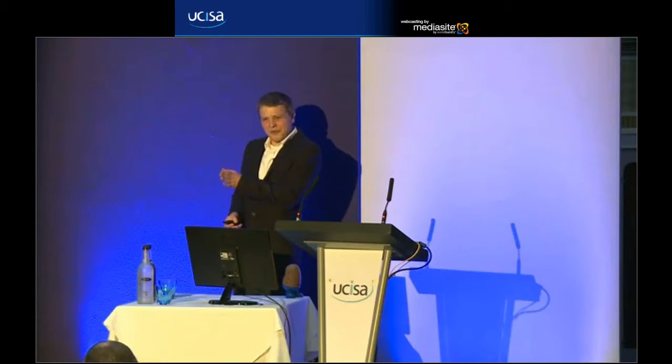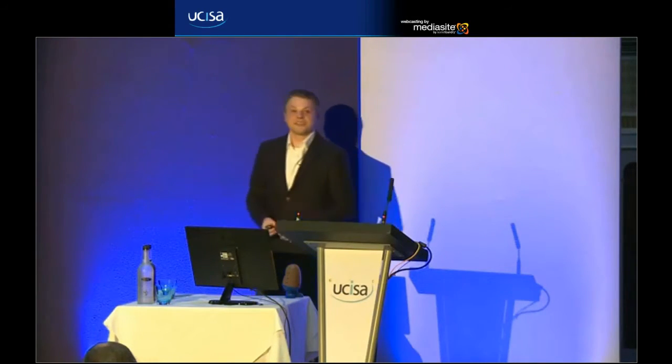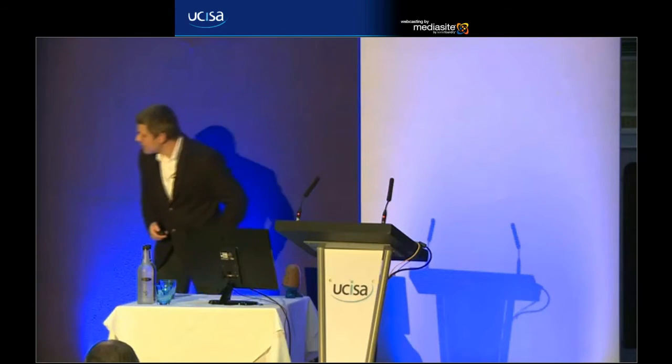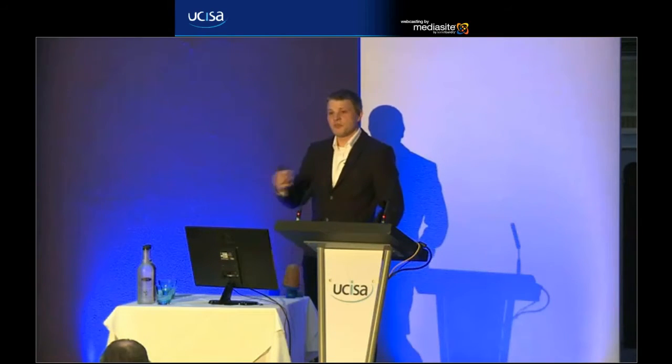We actually have our planning on the Friday. As you see, the planning is a bit odd being at the end, but it's really for the start of the next iteration. Just because it worked best for us, our developers like to come in on the Monday knowing what they're going to do rather than starting the Monday with the planning session. So that worked for us. It was very important that we kept the sprints and iterations at a fixed length. And you can work out a pattern that suits your team.